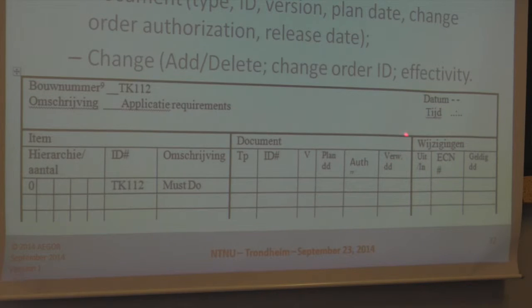And then about changes. There is an engineering change note, an enterprise change note, we call it now. That's mentioned: this document is due to this order, and the effectivity is given here. And we will say on that date, this document goes in and another one goes out.